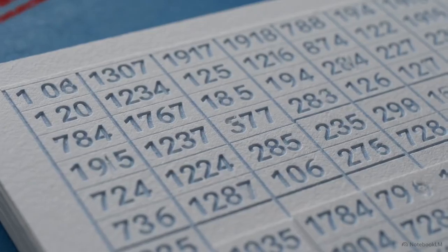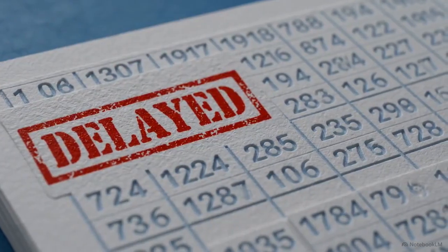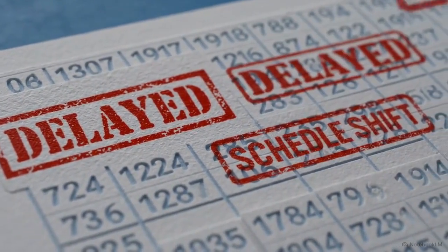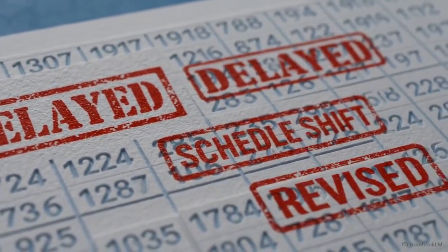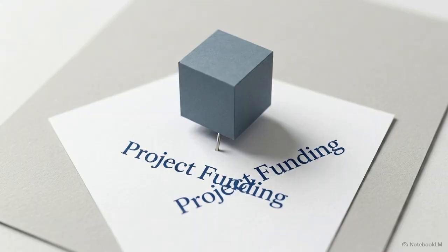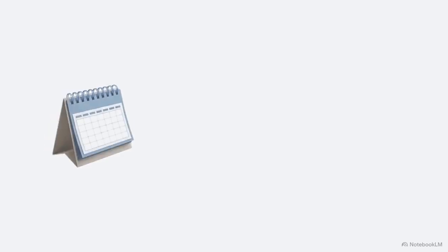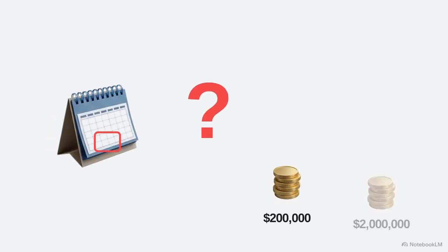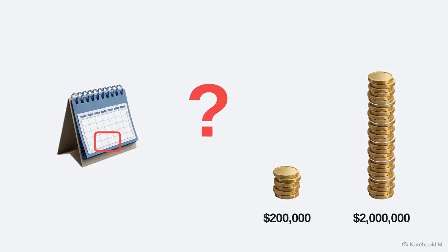Traditional accounting relies on flat ledgers. They capture total expenses perfectly, but when subjected to the delays of a real-world schedule, a static budget fractures. Securing $4 million for a project does not guarantee liquidity. A project can still stall if a controller cannot predict whether a specific month requires $200,000 or $2 million.